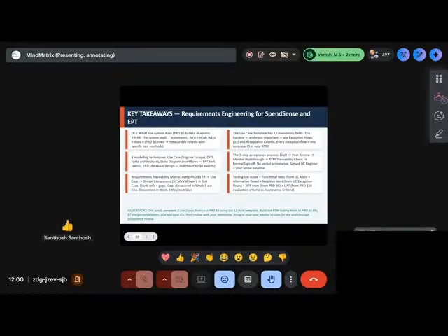Please use that use case template with all the sub mandatory fields. Use all the four modeling techniques mandatorily. Follow the 5-step acceptance process mandatorily. Create that requirements traceability back to your PRD, it is very important for you to trace it. Finally, ensure that whatever is being there is testable. So that means create the testing scope right from the requirements testing to unit testing to design testing, right up to the integration testing and user acceptance testing.